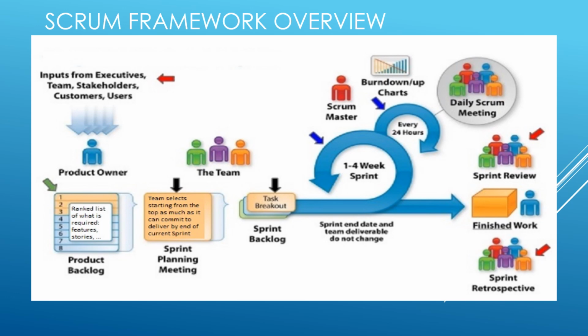On completing the sprint backlog, the Scrum team and stakeholders meet up in a sprint review to inspect the outcome of the sprint and determine future adaptation. Working software is reviewed against the done criteria and the product backlog is adjusted accordingly. Sprint review is time boxed to a maximum of 4 hours for a 1-month sprint, and for a shorter sprint it will be shorter.